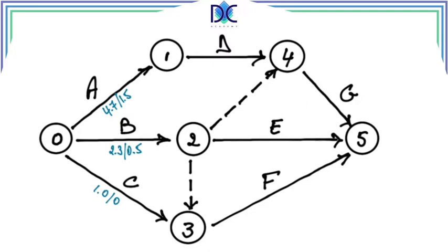Now you may wonder, where do these numbers come from? Well, in our case, they are obtained from the PERT or the 3-point estimates. We have those calculations. We know the optimistic, the pessimistic, and the expected value, the mode. These are elements that we can consider here, and we can calculate that. We can use those formulas. We can also have them obtained from a different estimation. For example, we have some probability distribution that leads us to these numbers, Monte Carlo or whatever statistical tool we may have. Typically, it was only used with the PERT and the 3-point formulas.